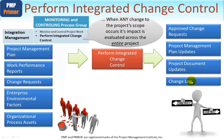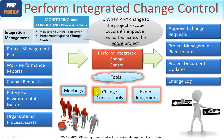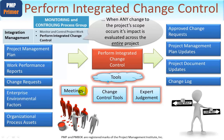Looking at the tools, there are just three. First, meetings — you can imagine that as a result of analyzing changes and considering potential actions, a change request is merely a request to look into it. We need to think through the impact if the answer was to proceed, as well as the way in which the change is to be implemented, since there may be several options. Having meetings along with appropriate expert judgment makes a lot of sense. In particular, you may well have a change control board on your project, and if so, its membership and authority will be included within the project management plan. Meetings may indeed be change control meetings run by the change control board.